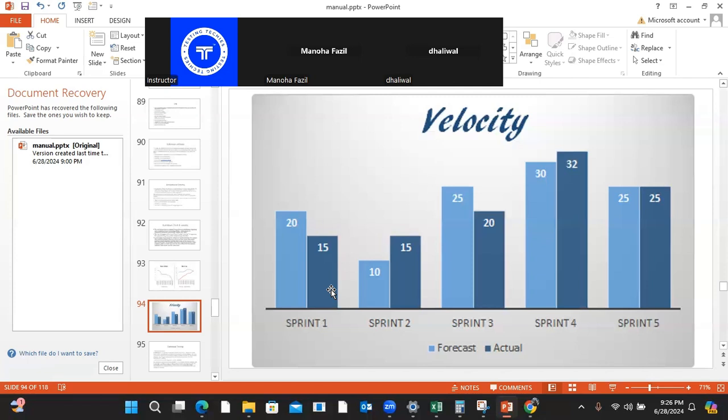Now, in the first-week sprint, maybe the client may not have an idea of the whole team. Maybe even the Scrum Master may not have an idea of how efficient the team is, meaning what they are promising, are they able to deliver it or not? But let's say if I have a 10-sprint or 15-sprint velocity chart, then it will give me a clear picture of what exactly the team is: are they just making false promises, or are they delivering everything on time?